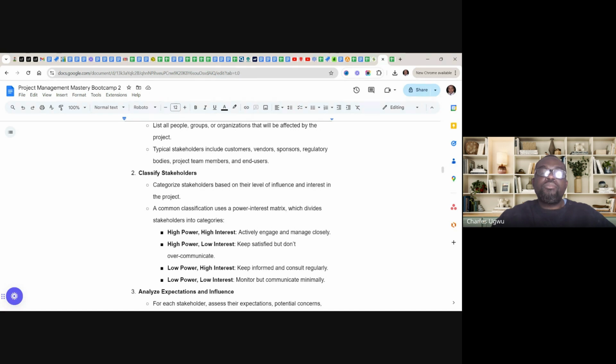So in high power, high interest, these are the big boys within the project. They have high power, and they have high interest. Actively engage and manage them closely, these people. Then we have high power, low interest. Keep satisfied, these people, but don't over communicate.